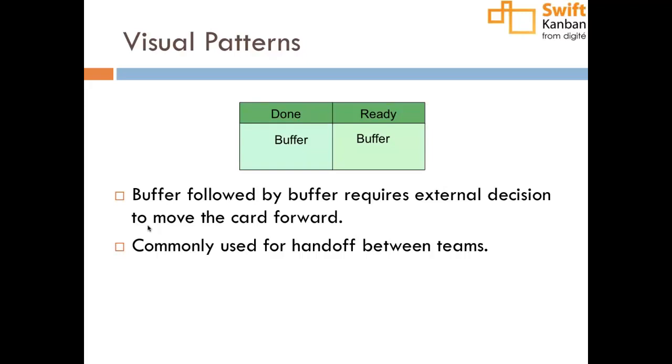So Mahesh, before we proceed to the next section, let's talk a little bit about some of the benefits of the visualization. One of the key differences you will find between a Kanban board and a traditional workflow system: in the workflow system, all the work steps or value steps are identified, and the work moves between those value steps. In Kanban, each value step is further broken down into waiting and working. Okay?